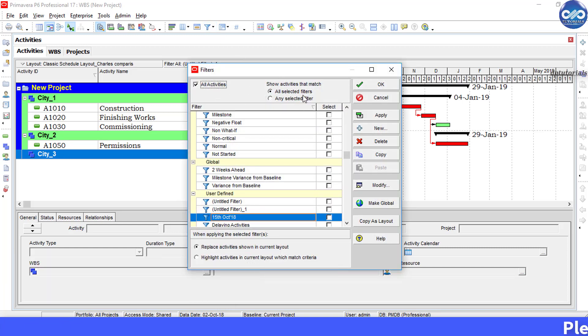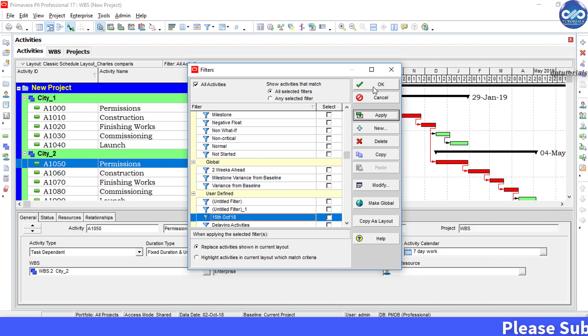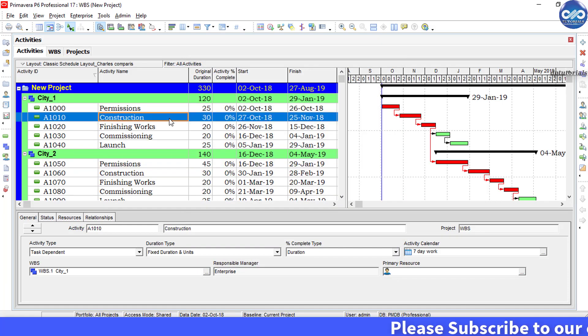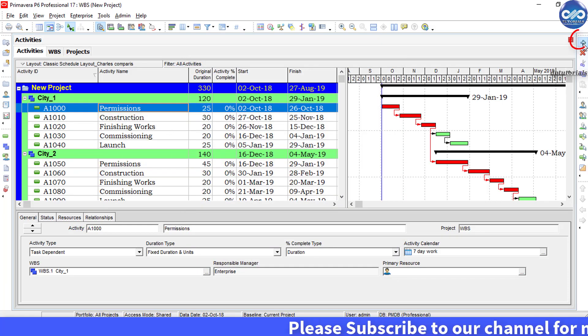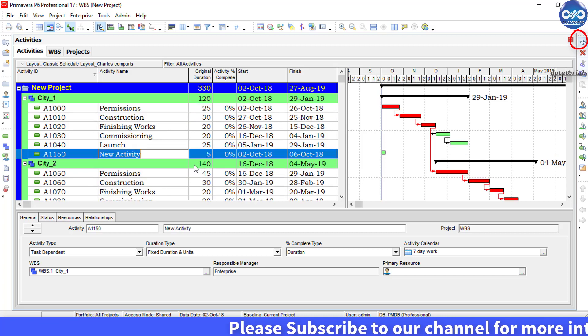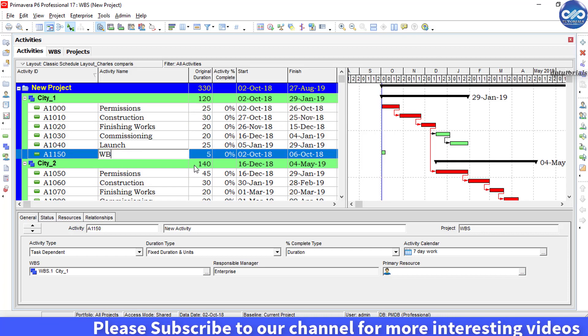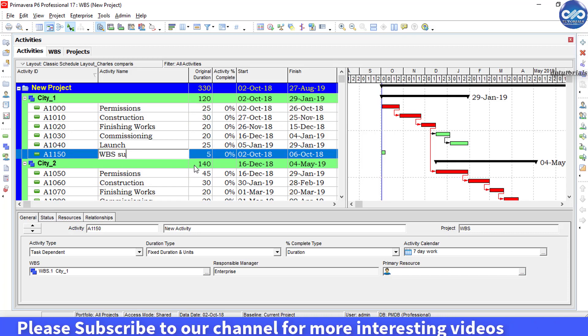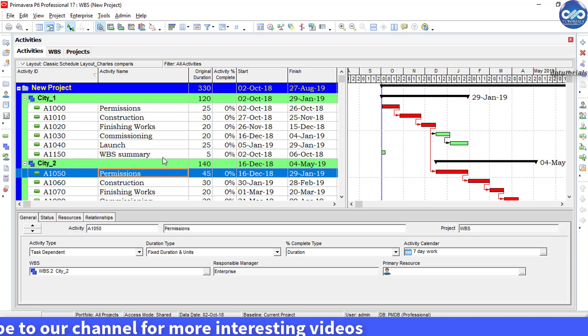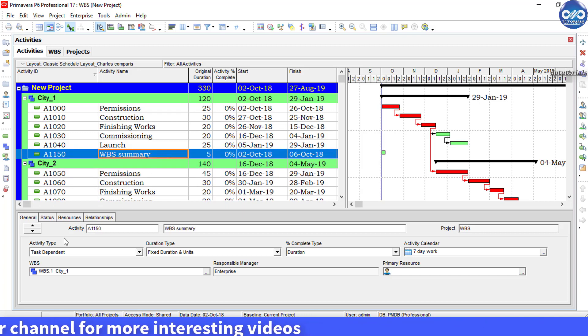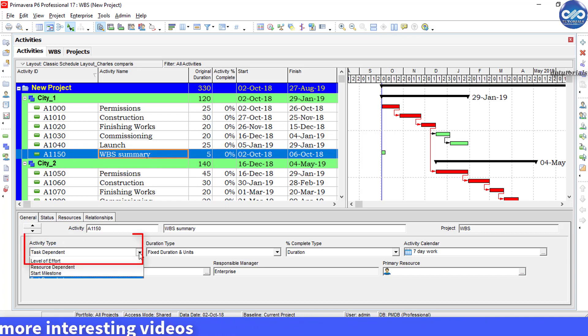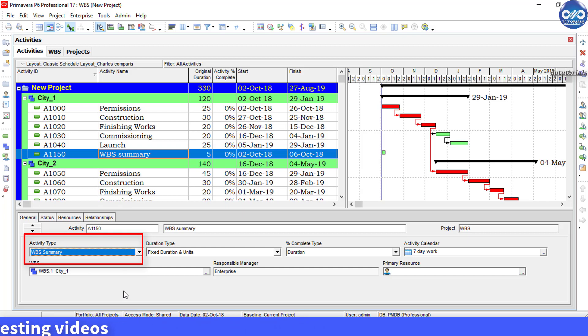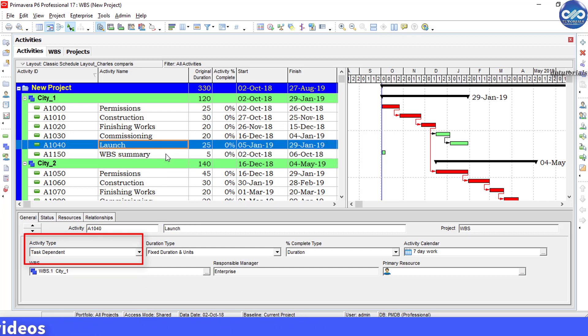Now click on this plus button to add a new activity and name it as WBS summary. From the details tab in the general under activity type, there is an option called WBS summary. Select that.